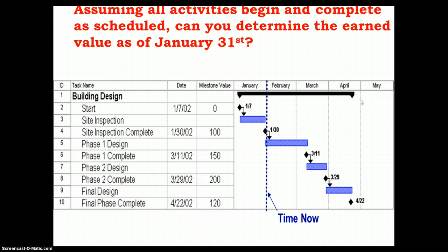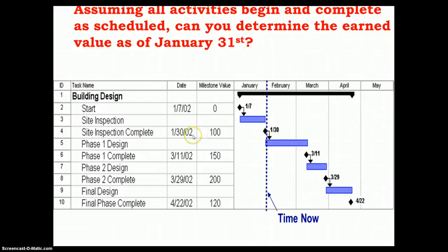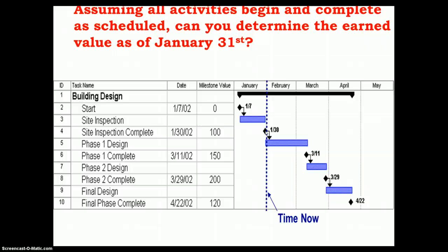Assuming all activities begin and complete as scheduled, the question is: can you determine the earned value as of January 31st? The project started on July 1st. The start inspection milestone has been completed but has no value associated with it. The site inspection completion has an earned value of $100,000. No further milestones are completed through January, so the current earned value for the period ending January 31st is $100,000, and the cumulative earned value is also $100,000.